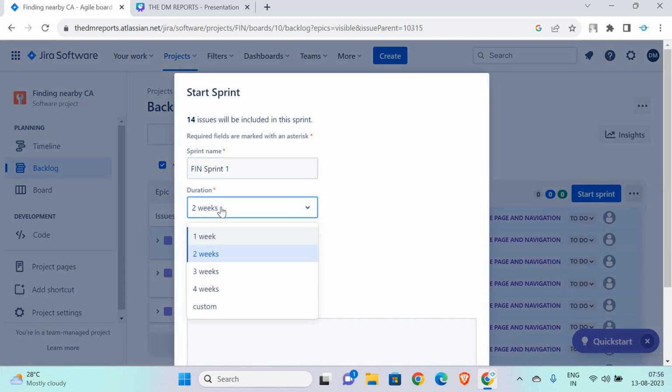As per Scrum definition and agile development practices, it is a good idea to keep a 2 to 3 weeks timeline as the deadline. A minimum of 2 weeks is enough for a team to deliver sprint 1. And we also have to take care that we avoid any rework or mistakes when we are starting the project. What is the meaning of that? In the first hand, when we are starting a project, we will try to start everything with proper project planning and sprint planning.